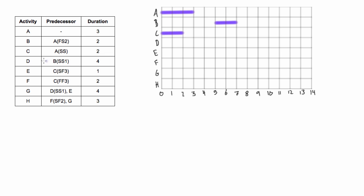Activity D depends on activity B. It's a start-start relationship with a lag of one. So we find where B starts, come down to D, and since it's a lag of one, we go out one. This is four days long, so we'll go from six out to ten.